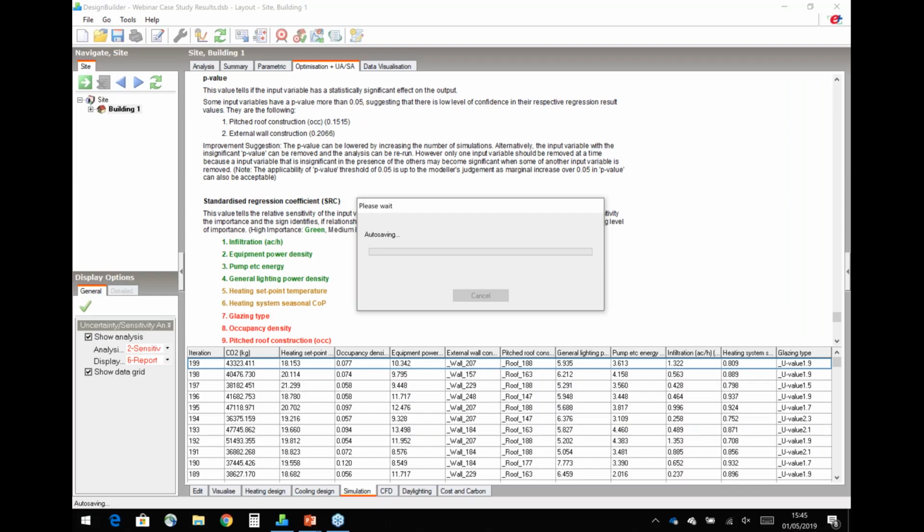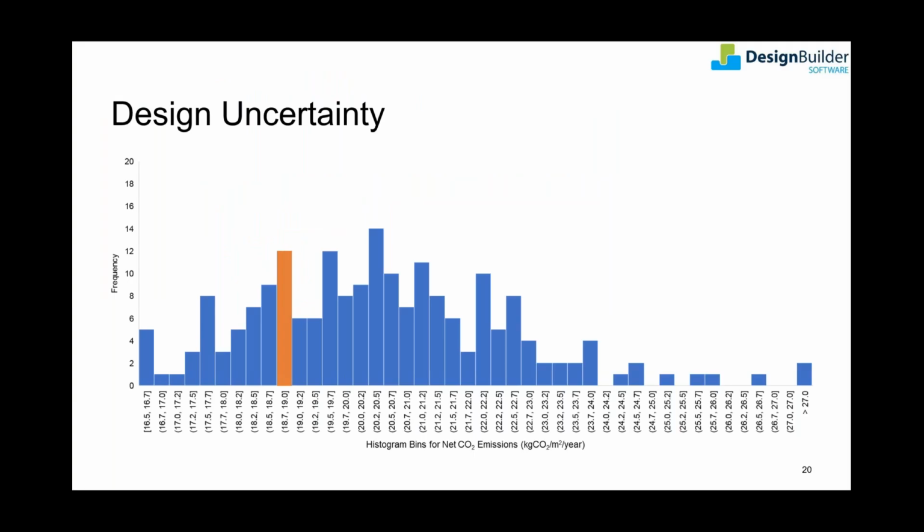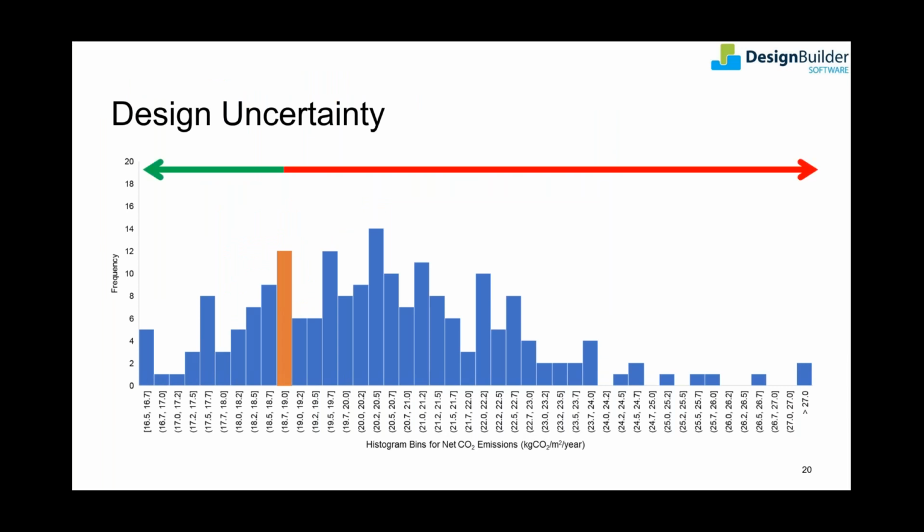Looking at the spread around the target value, within the assumed uncertainty scenarios, it is easier to underperform and miss the target. The chances to meet the target are only 25%, and 75% chances are that the building, when operational, would not be able to perform as desired.